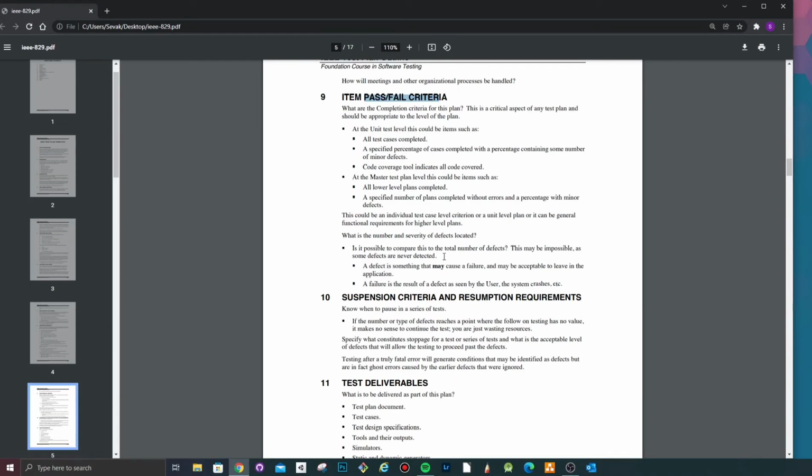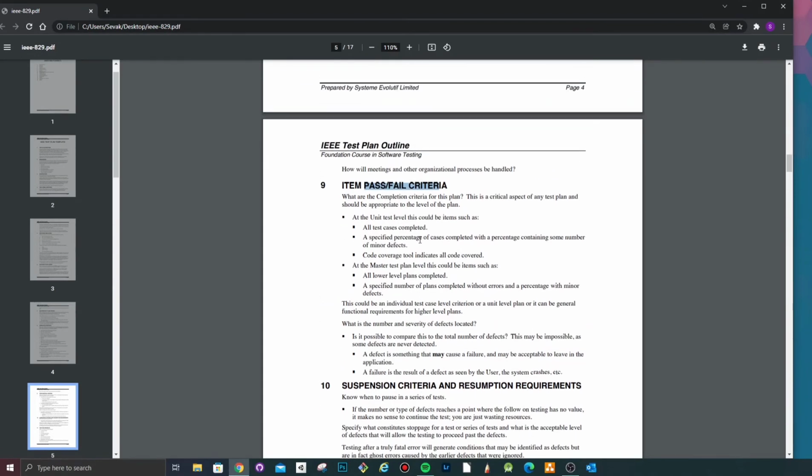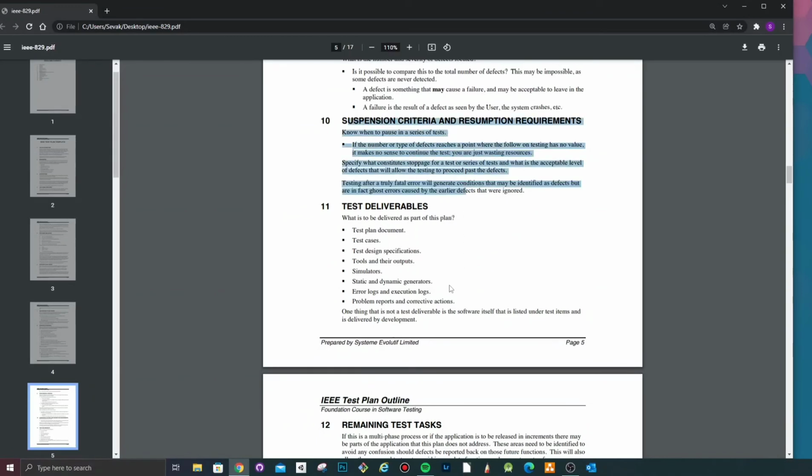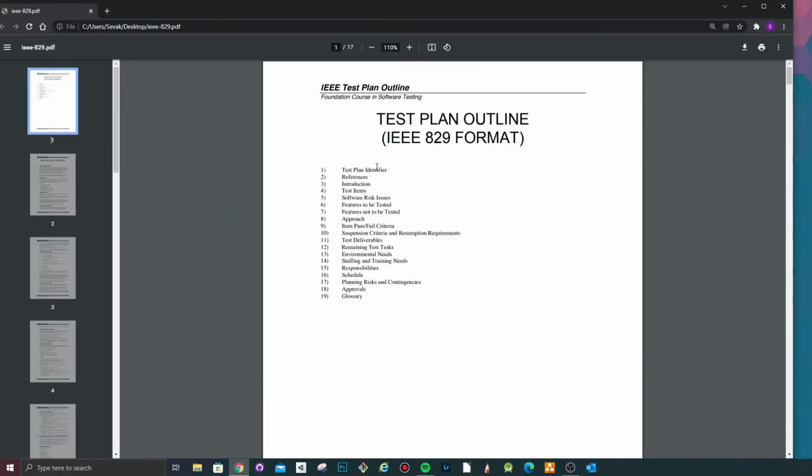So entry criteria would be something like at least smoke testing has passed, at least certain things like the documentation on the new features having been built has been completed, obviously the features have been built, etc. What I mean is the wording may differ, but the general structure should be similar. Yeah, and the key point in here is: what are we testing?